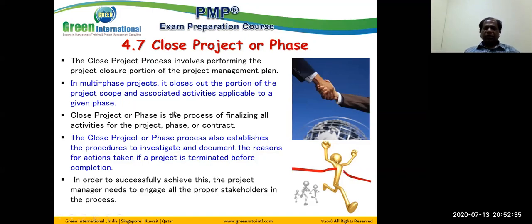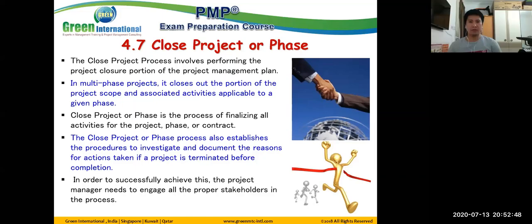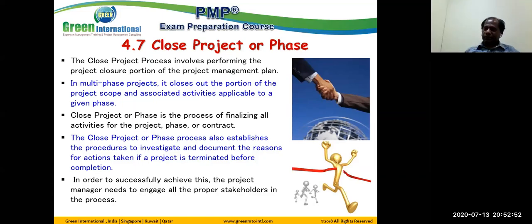The close project or phase process also establishes the procedure to investigate and document the reasons for action if a project is terminated before completion. Meaning, even if your project is terminated midway, still you need to perform the project closure. Okay, project is terminated, you are so happy, so you go back and sleep.